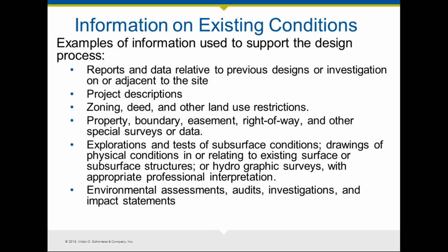If there is a variance process and the client or the owner is going through an entitlement process with the county or the city to be able to change the use, be aware that although you may have practical information about how that process is going to work, that is essentially a legal process, and the owner will have to rely on their legal advisors to get that done.